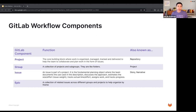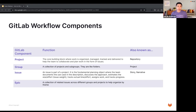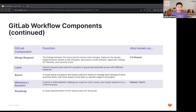Next, we have the issue — part of a project, and a fundamental planning object where the team documents the use case in the description, discusses the approach, estimates size and effort using the issue weight, tracks actual time and effort through time tracking, assigns work, and tracks progress. This is also known as a story or narrative in other tools. Next, we have the epic — a collection of related issues across different groups and projects to help organize by a specific theme.